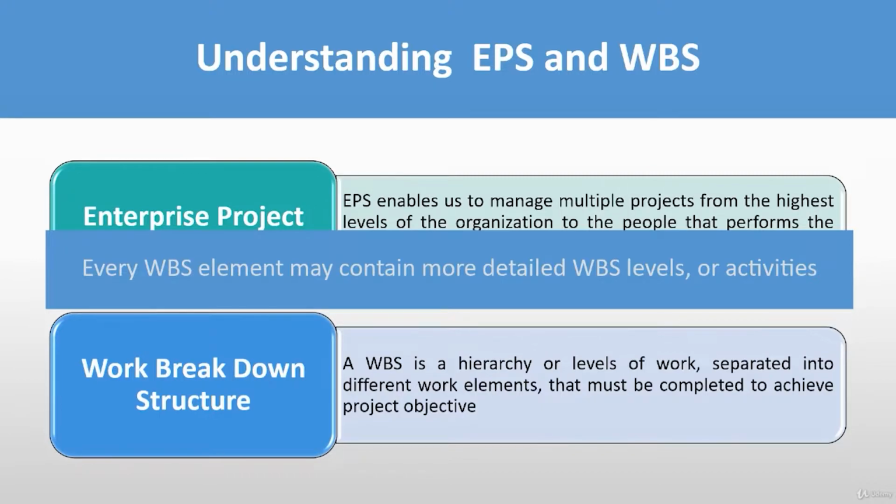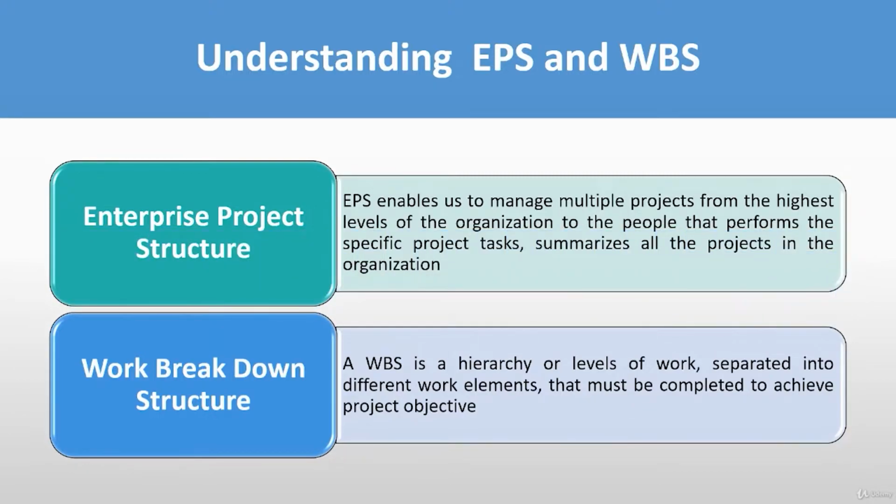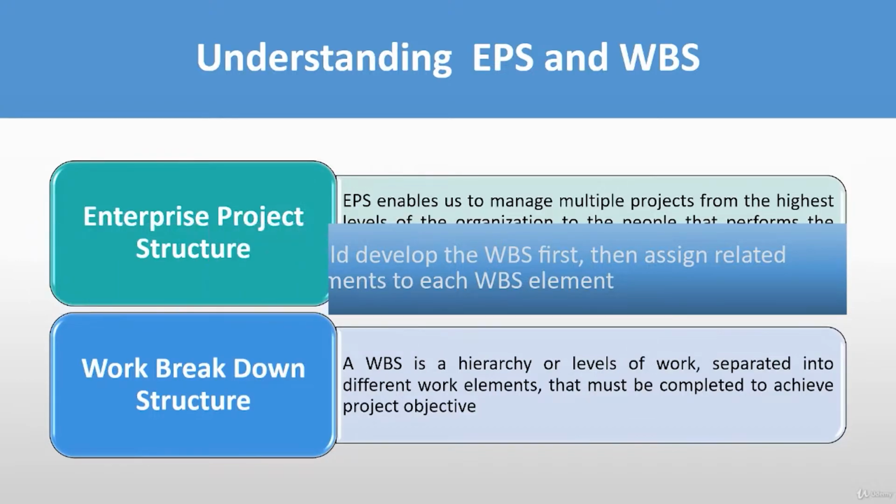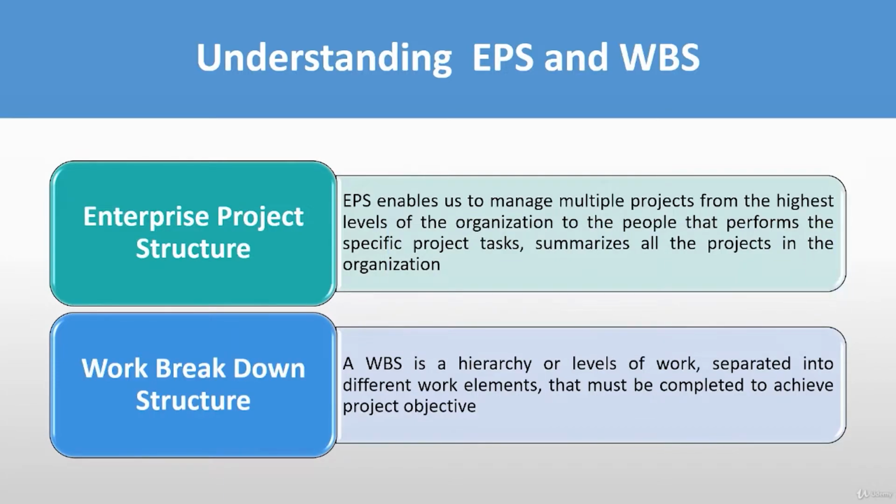Please remember that while creating a project, the project manager should develop the WBS first, then assign related documents to each WBS element, and after that create activities required to complete the tasks for the respective WBS element.